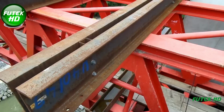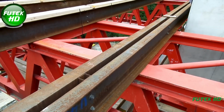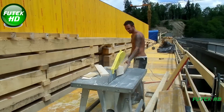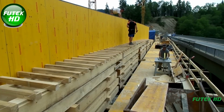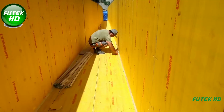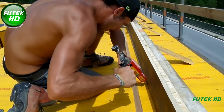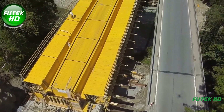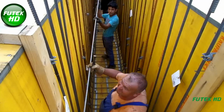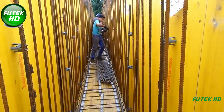On the crumbox side, a 60-meter-long and 6-meter-high retaining wall was constructed as part of the ramp alignment improvements. This phase involved excavating a portion of the hillside to create a stable embankment. To reinforce the steep slopes and prevent landslides, additional anchored walls were installed, with one 24-meter-long wall covered in limestone cladding for both structural support and aesthetic value.